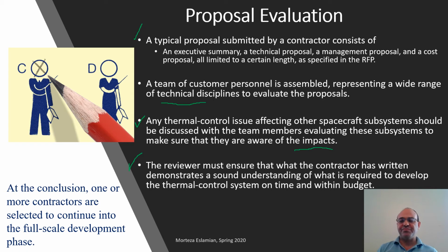So for instance, if the contractor has underestimated the thermal control and thinks that it's very easy and doesn't take time and budget, it can actually raise a red flag, when something which requires some amount of time and budget is ignored.